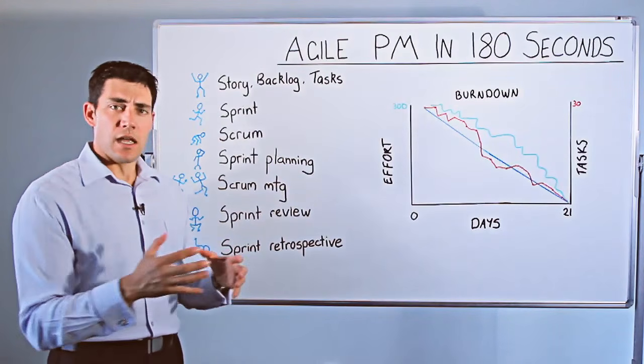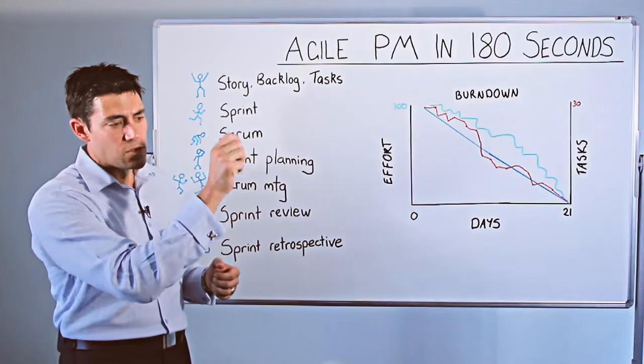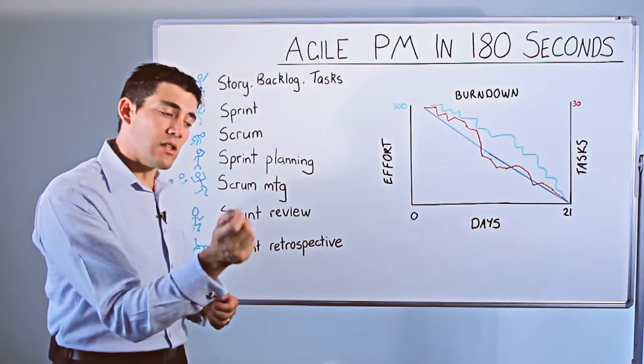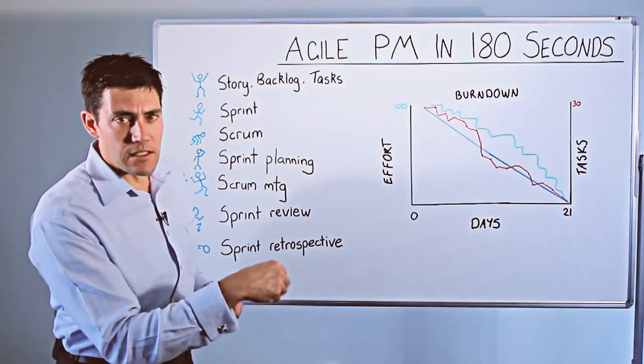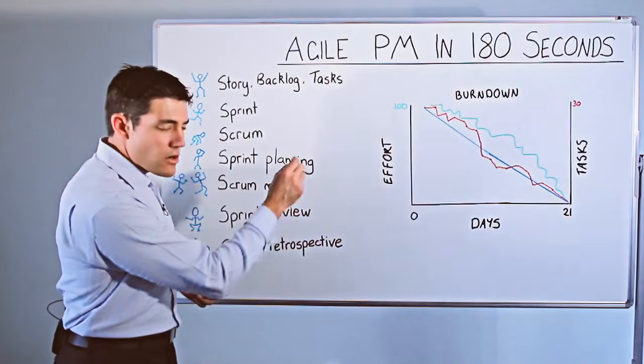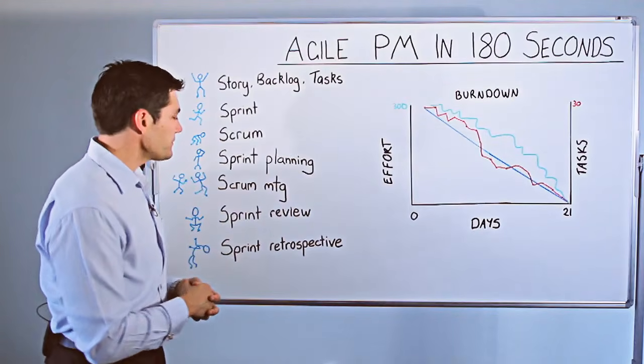Get your project team together, get that Scrum together, and they'll look at the backlog and say, yep, we can do this one, yep, we can do this one, we can get the functionality so they can drag that shirt into their shopping basket, we can get the functionality to actually make that credit card payment. They're the ones who are signing off on which items in that backlog they're actually going to deliver.